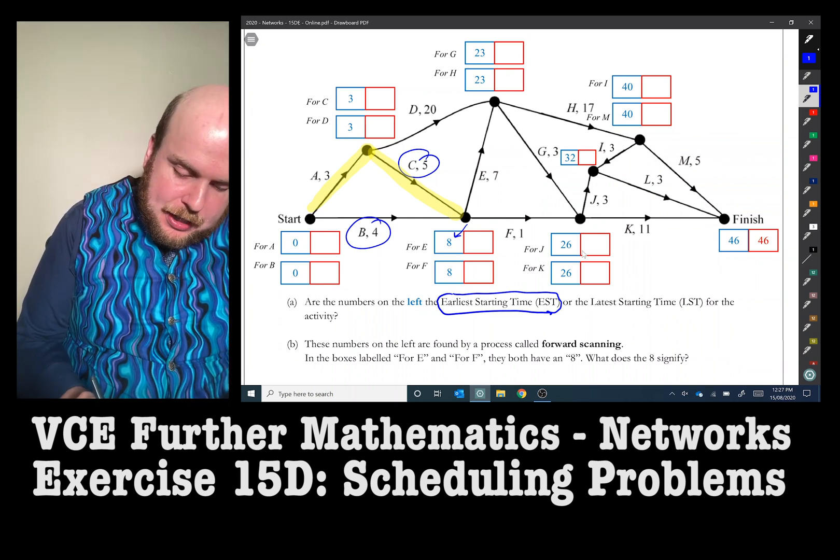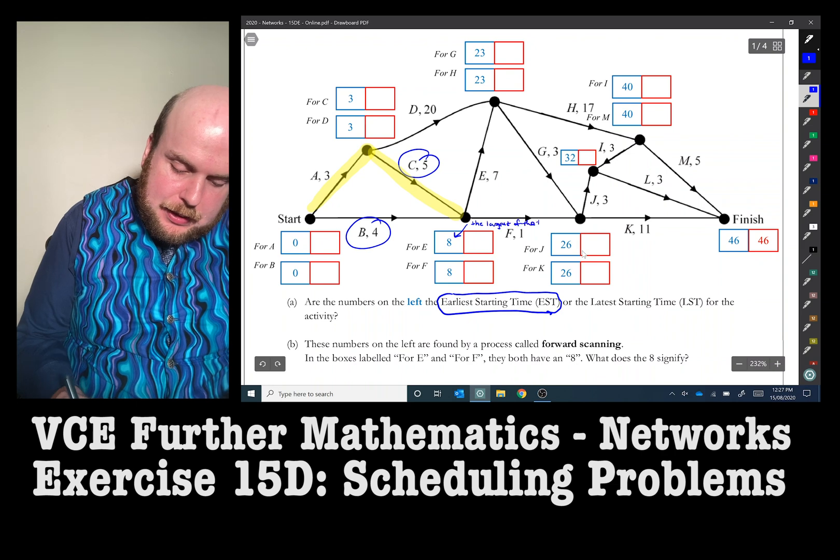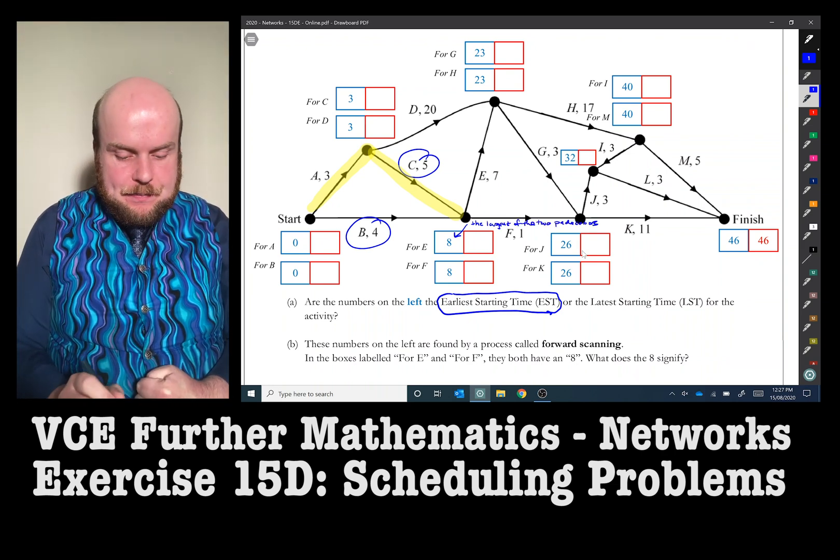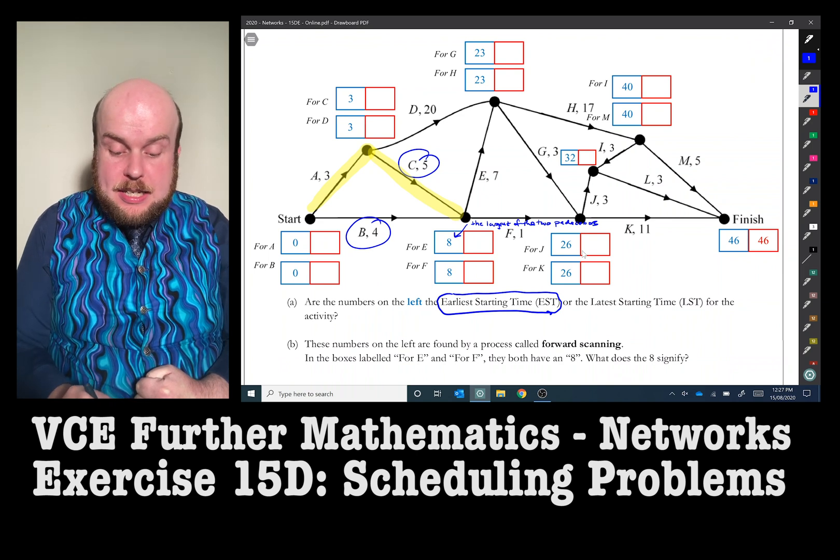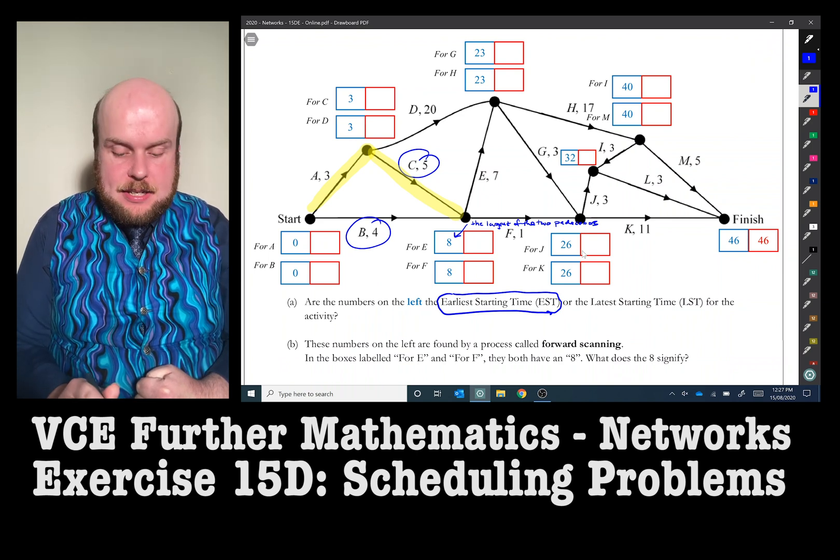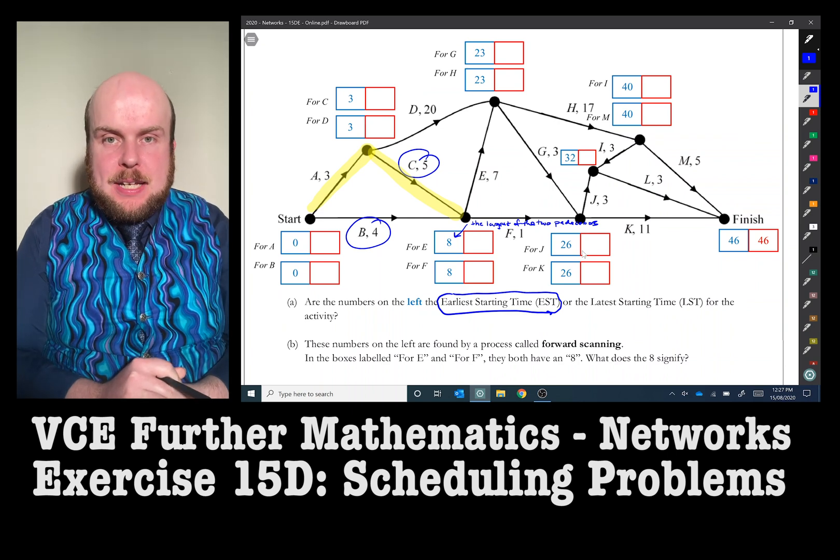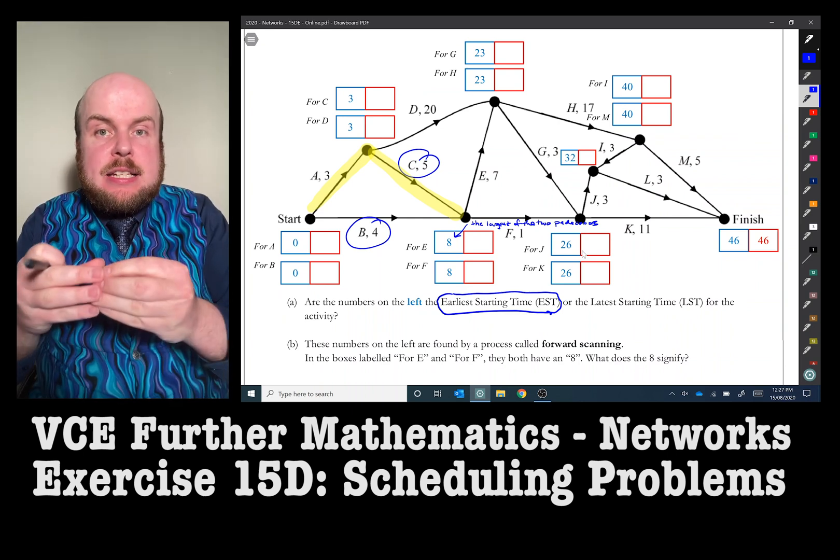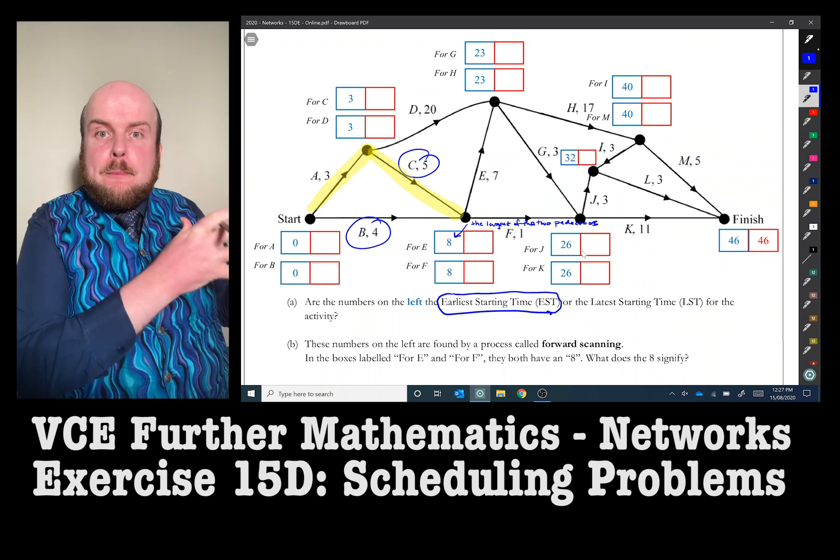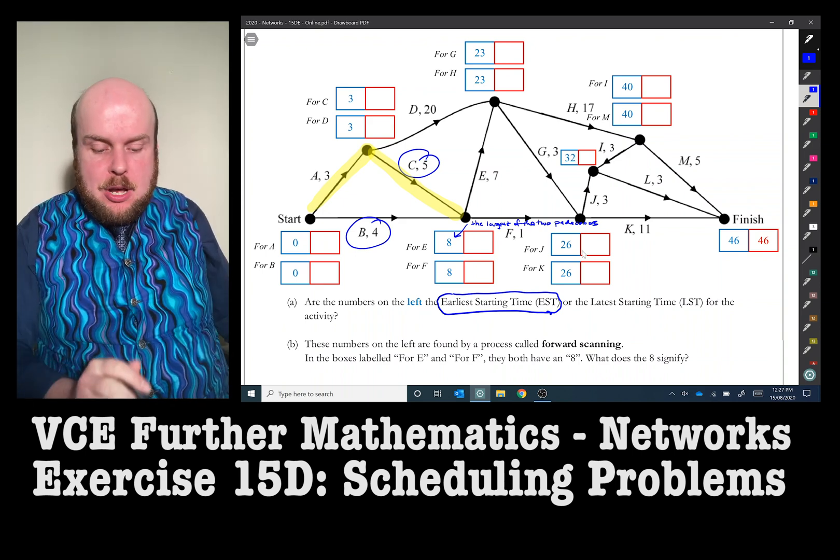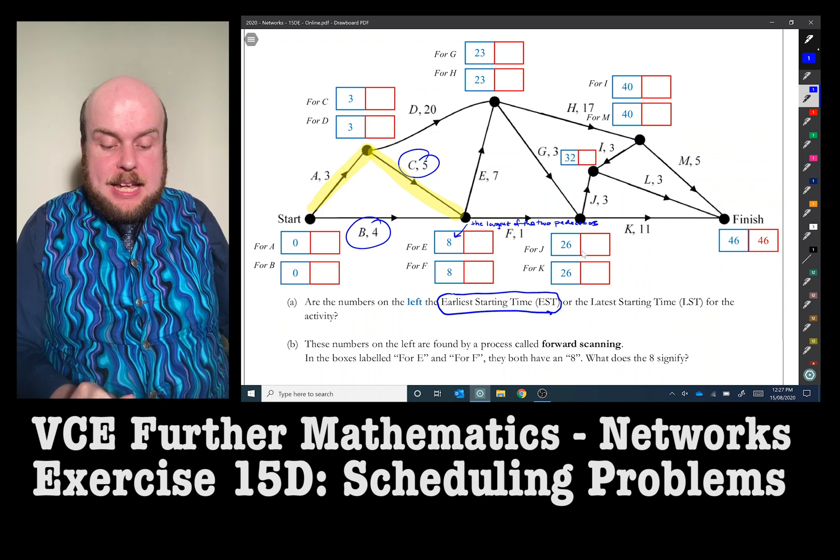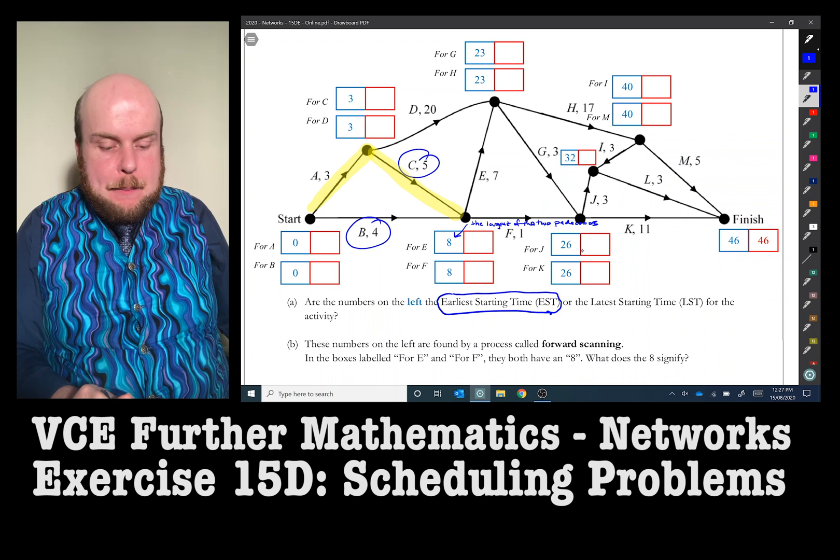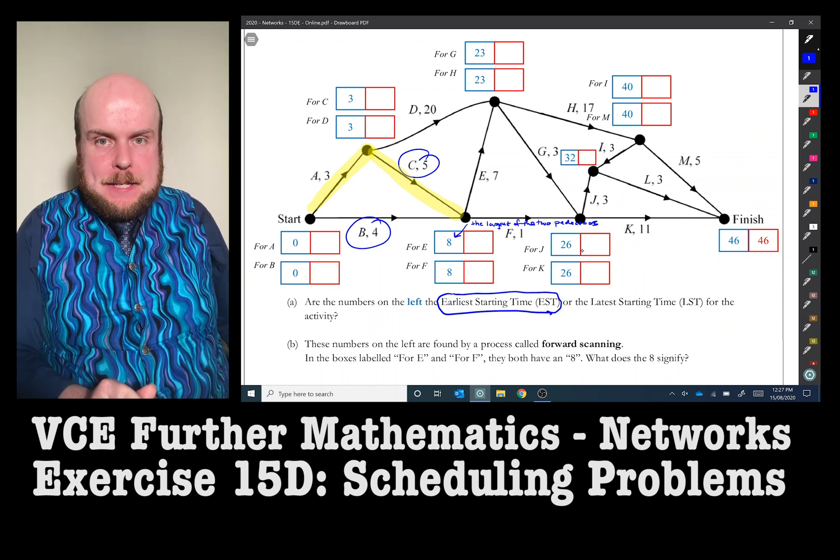So the largest of the two predecessors. For E to, in order to get E started or F started, it must be eight hours into the project because remember that we cannot start an activity until all the predecessors have been done. We cannot start E until C and B have been completed and C can only be completed when A has been completed.